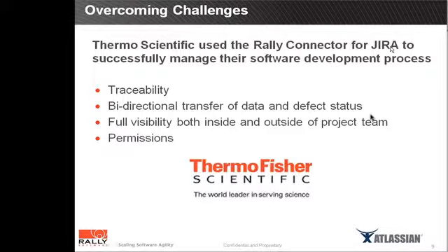We're also required to maintain and archive more written documentation than is typical in an Agile project. While we try to remain mindful of the Agile manifesto and value working software over comprehensive documentation, the FDA, on the other hand, insists on written documentation. So what we do is we capture the necessary details of each user story in Rally and then export it to Word documents via XML for archival. Rally's user story ID provides the necessary link for the traceability through all of those objects.